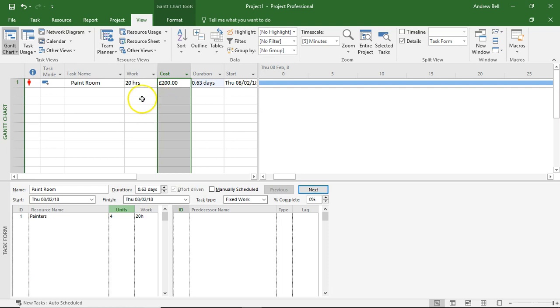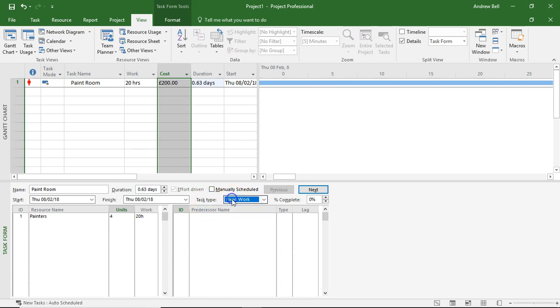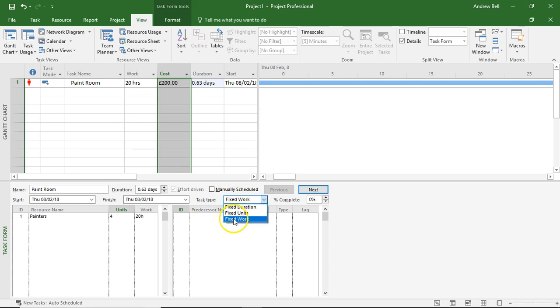So an example of how we need to set the task type to be the correct task type. Next little video clip, I'll have a look at a fixed duration task and see what happens there. The important thing here is that the default is fixed units. Most engineering type tasks are fixed work.